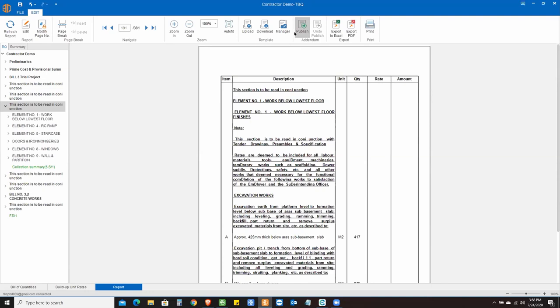Now, what I'm going to show here is that if you do the publication, then you'll get access to the addendums. All right, and that will then create addendum version 1, version 2, and 3. And on the other side, the contractor will just import that addendum 1 or 2, and it will automatically reflect in the bill of quants that he has been working on. So this brings me to the final part of my presentation. I'm going to wind up soon.